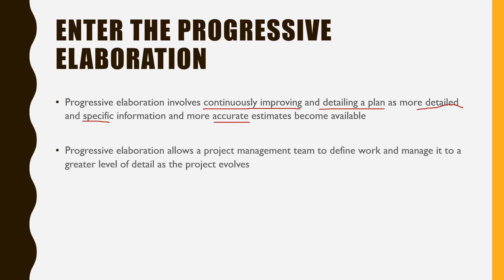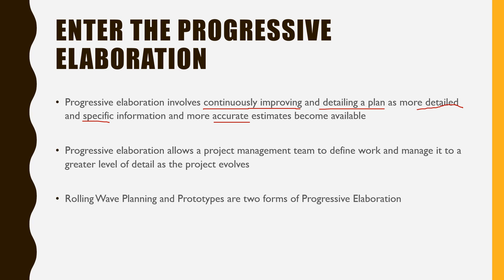Progressive elaboration allows the project management team to define work and manage it to a greater level of detail as the project evolves. You may not have all the information for a work package that's among the last ones to be delivered. As the delivery date for those work packages draws closer, you will have more information and will be able to plan in much better detail. It should be noted that rolling wave planning and prototypes are two forms of progressive elaboration. We've already discussed prototypes in a previous video — a link is in the description below.